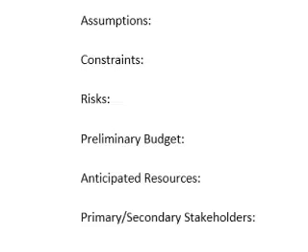Your preliminary budget is the cost that it takes them to update the computers, and if they're being paid $10 per hour and you can do 6 computers in an hour, how much is it going to take to pay them?